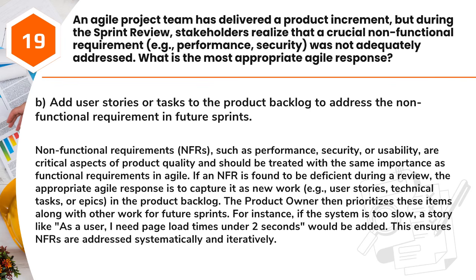The product owner then prioritizes these items along with other work for future sprints. For instance, if the system is too slow, a story like, as a user, I need page load times under 2 seconds, would be added. This ensures NFRs are addressed systematically and iteratively.